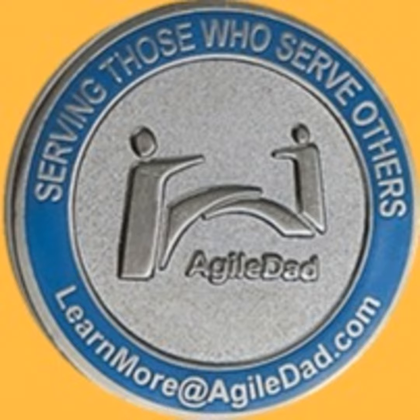Okay. And the final factor you should consider when prioritizing is dependencies. If you have dependencies between product backlog items, some items may not be high priority on their own, but they're necessary to deliver another high priority item. When that's the case, the enabling but lower priority item needs to be escalated to be a higher priority item so that it can be done since something else is dependent on it. This just makes a lot of sense.